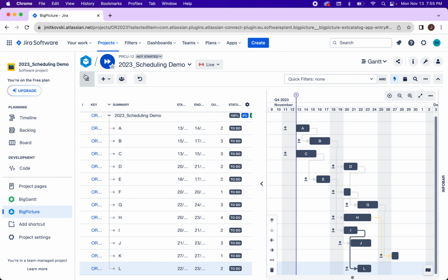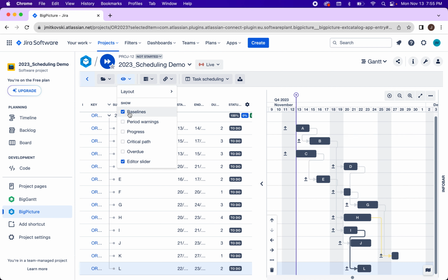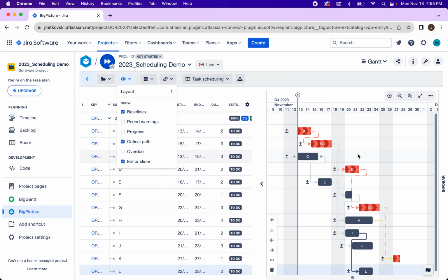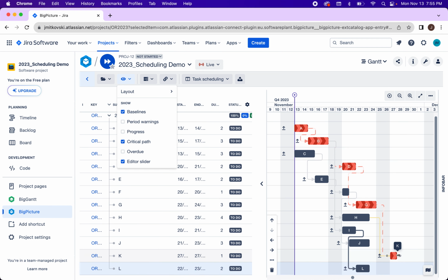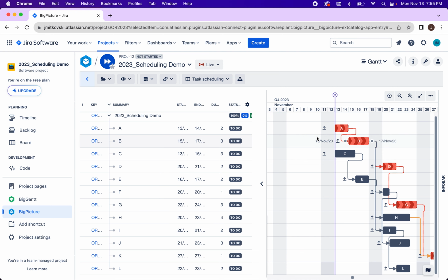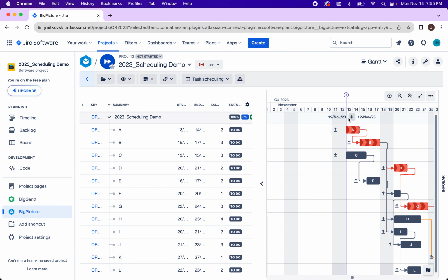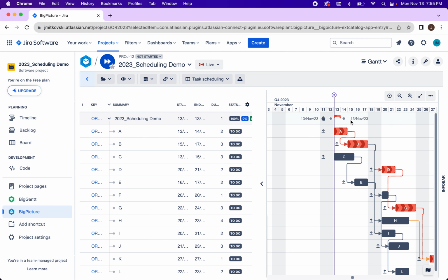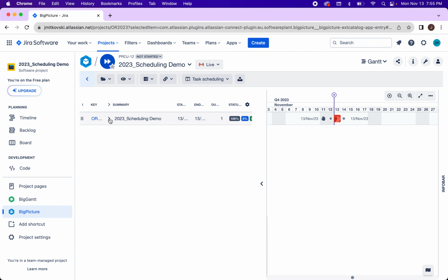And the last thing that we want to do here is we want to just be able to see the critical path. So what I'm going to do here is just highlight this, and I believe in class A, B, D, G, K was the critical path itself. Okay. And what I'm going to do here is I'm going to just put this over here. Okay, this is the parent activity, and all of this should roll up to this.